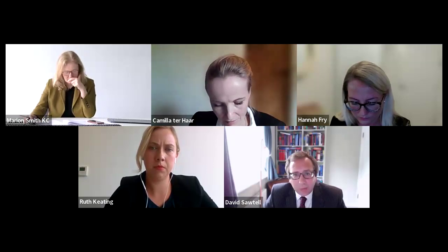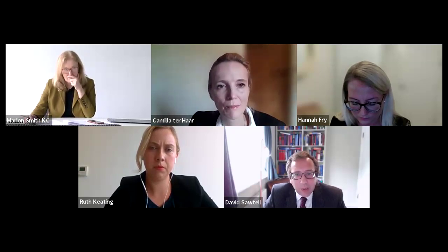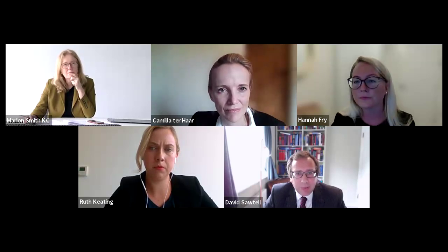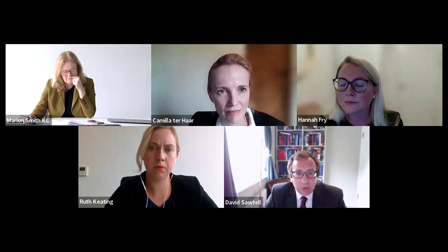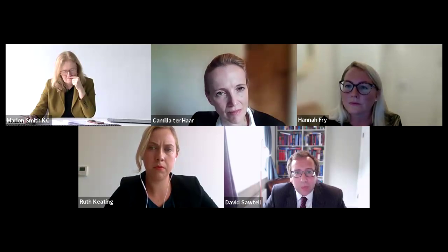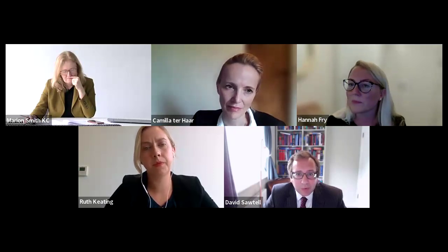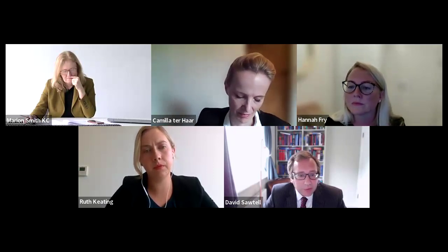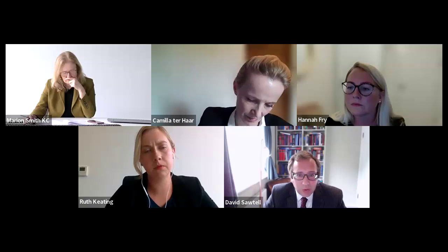There are comparable changes in the minor works form. But all this means is if you're going to be building a higher risk building, you're going to have to produce a whole new range of bespoke amendments to your JCT form to deal with golden thread requirements, change control applications, and the new gateway regime.